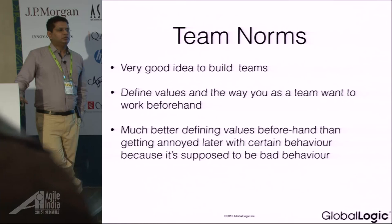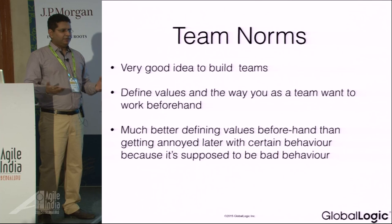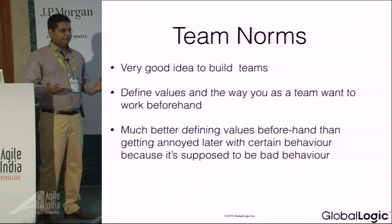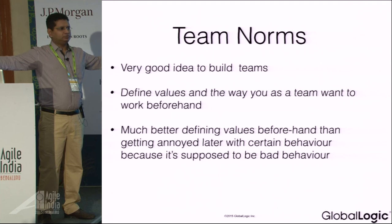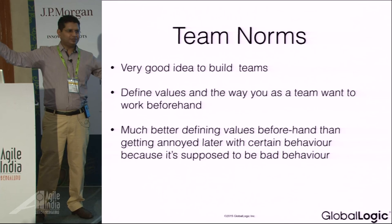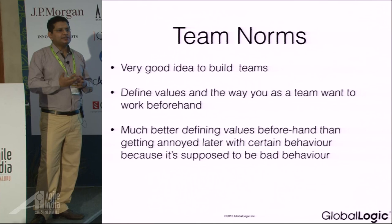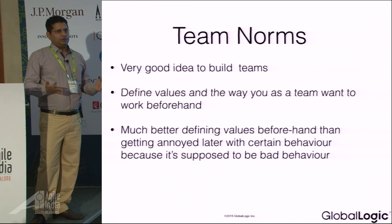You need feedback, and if something is not working, feedback happens through the retrospective. If your retrospective is too far away, that feedback will be gone. You should have smaller sprints — at most two weeks. If it is four weeks, by the time you get to the retrospective, you've forgotten what happened or other things have come up. It is important to have a mechanism or forum where you can discuss feedback, and the retrospective is that forum. In order to make the retrospective work, the sprint cycle should be smaller.